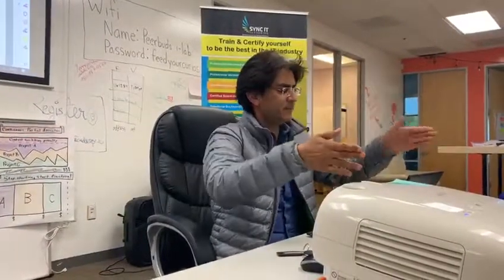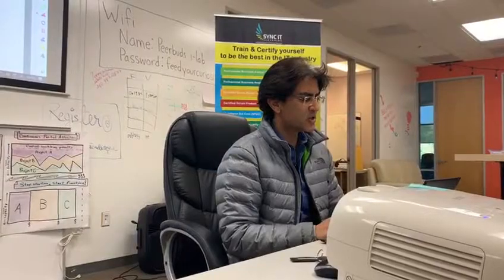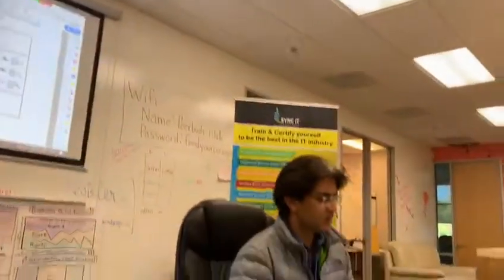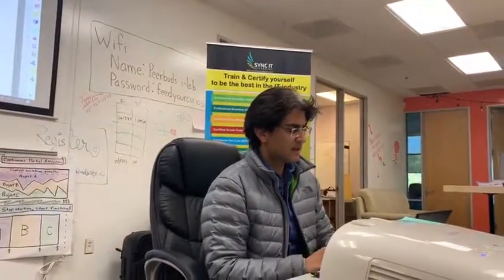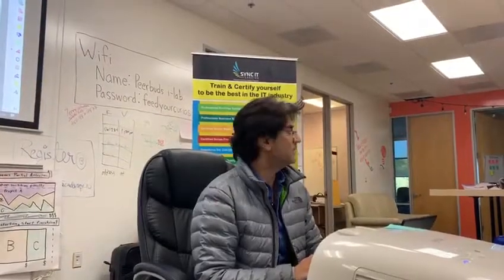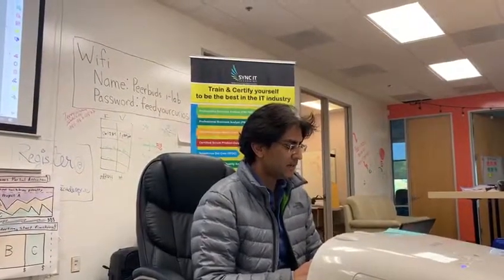Imagine it's a 14-day sprint. I start off with 40 requirements. As days go by, the outstanding requirements should go down, right? I start off with 40 things to do, and as I go through the days, the work remaining should go down — that means work is being done.